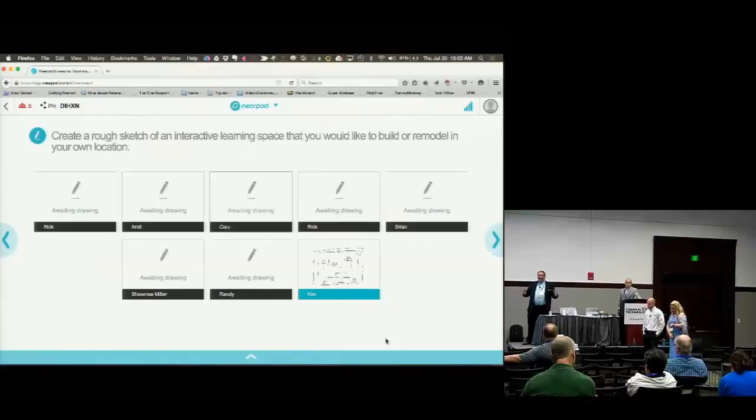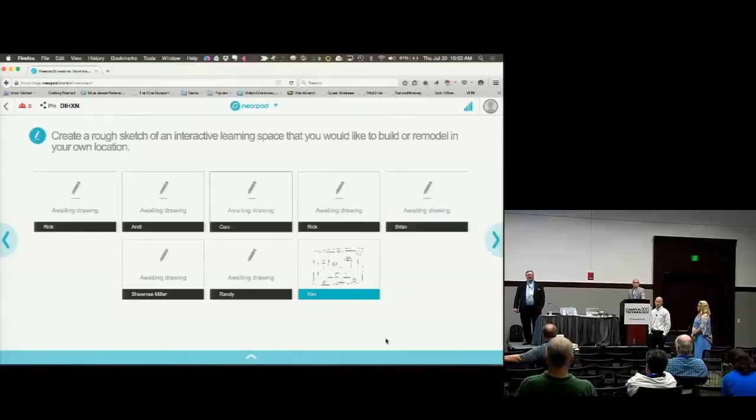We put together the package, we came up with the design, and then we put it out for bid. It was a sealed bid, and we opened the bids, and it was a low bid that could meet very specific criteria. We did put in some criteria about how close, how far away you had to have a service center. We didn't just say, Bill's House of Pancakes and Electronics on the other side of the country could bid this. You had to be CTI or CTSI certified. You had to have the A+ certification programmer for AMX on staff, that sort of thing.